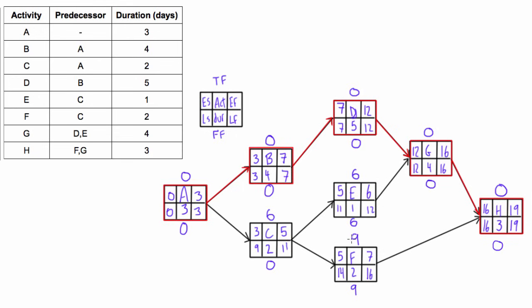Recall the difference between total float and free float. Total float is the amount of time any given activity can be delayed without affecting the end date of the project. For example, anything on the critical path — if you delayed it by even one day, you would extend the entire project duration by one day. Take activity D: if we delayed it so it finished on 13 instead of 12, then G would have to start on 13 and finish on 17, and activity H would start on 17 and end on 20 — increasing the whole project duration by one.